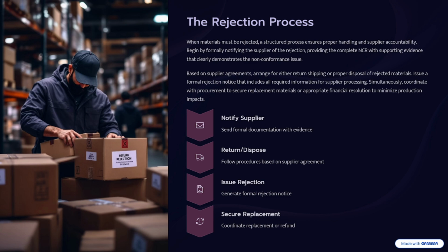You will send this NCR report to the supplier, mentioning that the non-conforming materials that arrived at site are not as per the approved material submittal, and that they have failed to meet the quality requirement. As a notification you have to send to your supplier, you will mention that you need to implement the return and dispose agreement with our management. What is the procedure of return and how you can return to them, and everything has to be mentioned in that email, whether it should go to the site or it should go through the procurement, then it will come